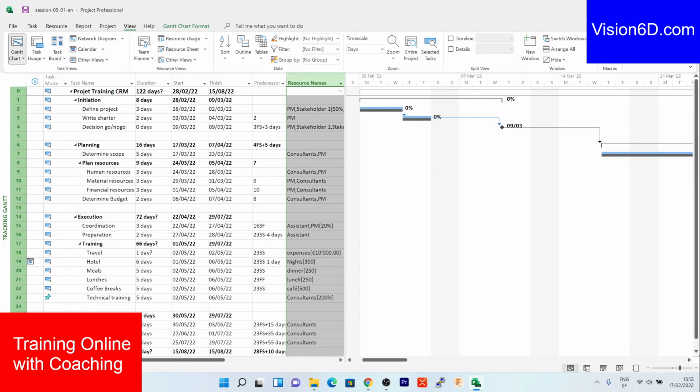That's why having a baseline is really important, because this is what you are going to compare your actual situation to, meaning, for example, how are my costs? How is the work done? How are we advancing? You will always find those answers because MS Project is going to compare the gray lines with the blue lines.